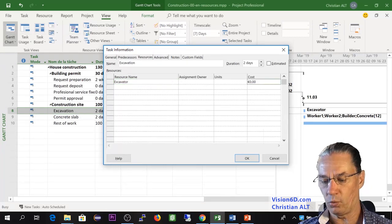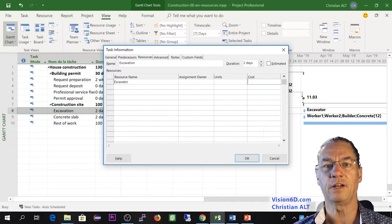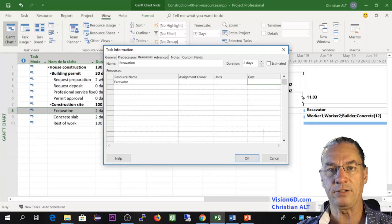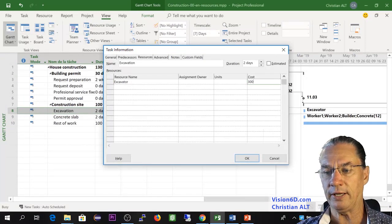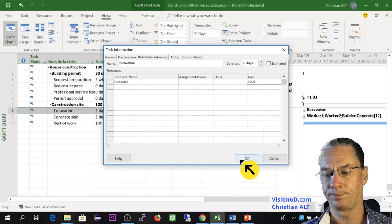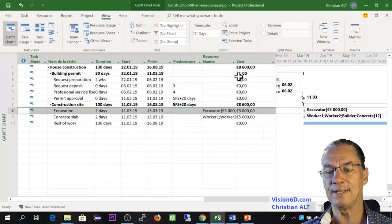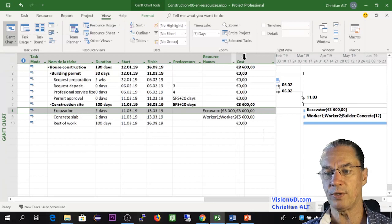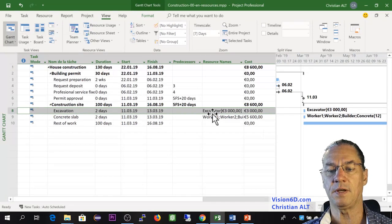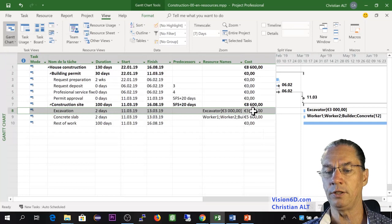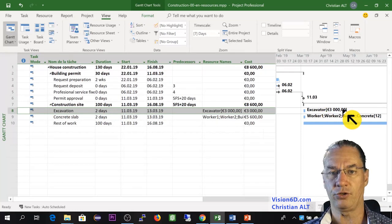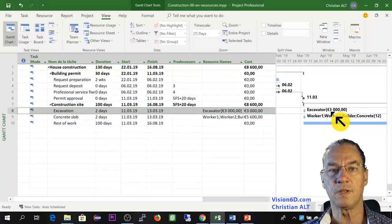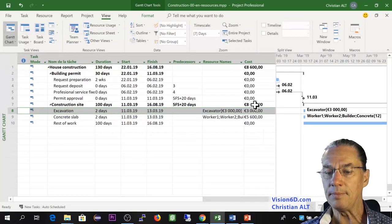And what I propose is that we say it's 1,500 for one day, 3,000 for two days. And this is a flat rate. So I put it directly here into the cost column. And you see that since it is a cost resource, the cost has directly come here in bracket beside the name of the resource. We find it also here in the cost column, and we find it here on the diagram directly beside the resource name, which is the excavator.